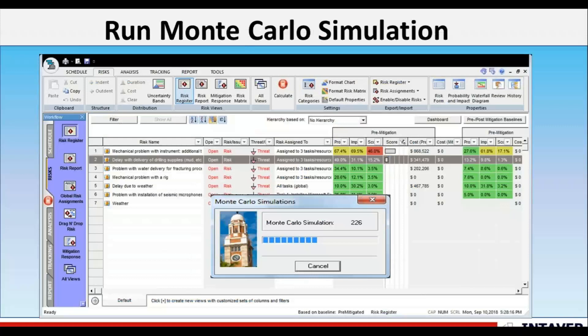Once we've assigned all the risks, we run a Monte Carlo simulation. The system will run probabilistically and automatically generate and prioritize the most critical risks. For risk scores and ranking, we give a color bar based on the criticality of the risks. We can then rank them based on their overall impact. It's also possible to slice and dice the impact based on cost, finish times, duration, and other risk impacts such as safety, reputation, and QHSE. The key is that once we run this Monte Carlo, we want to understand and prioritize our risks based on their objective, model-based impacts on the project.